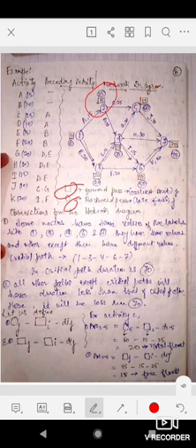So what do the values inside the circle and square represent? See here, inside the square and circle we have 0 and 0. Here we have 20 and 20, and here 35 in the square and 60 in the circle. What do they represent? At node 1 in the square we have 0, so it means we will start activity A at time 0, the earliest starting time.